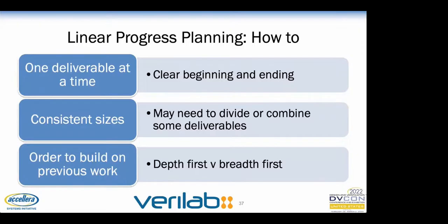One is to realize that the team should be working together on the same deliverable as a group. We want to start a deliverable and work only on that deliverable until it is finished. This allows us to check whether or not our estimates were good, and allows us to report a deliverable as done in a way that we don't have to come back and revisit it.